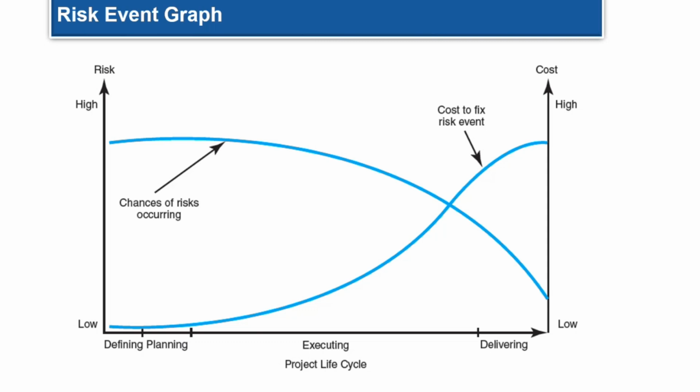If you look at the chart, you can see when the event moves forward, the risk curve changes. The risk curve starts to flatten out a little bit. As the project passes the halfway implementation mark, the cost of a risk event occurring increases again. So if you look at the chart, it's flattening out, it's reducing. However, when it's past the midway point, the possibility of risk occurring increases again.